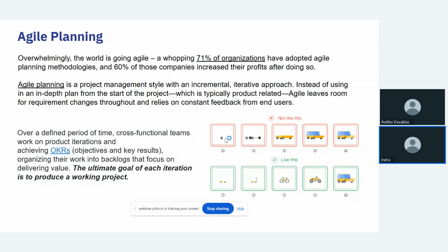If you see, there are two approaches to complete one project. The first approach is the wrong approach, because in this project, it shows that we are building separate non-functional parts. For example, first we are developing a wheel, then the axle, then the wheels, the upper body, and then the chassis, then the car, right? So at this stage, you will be able to use the product only at the last stage.